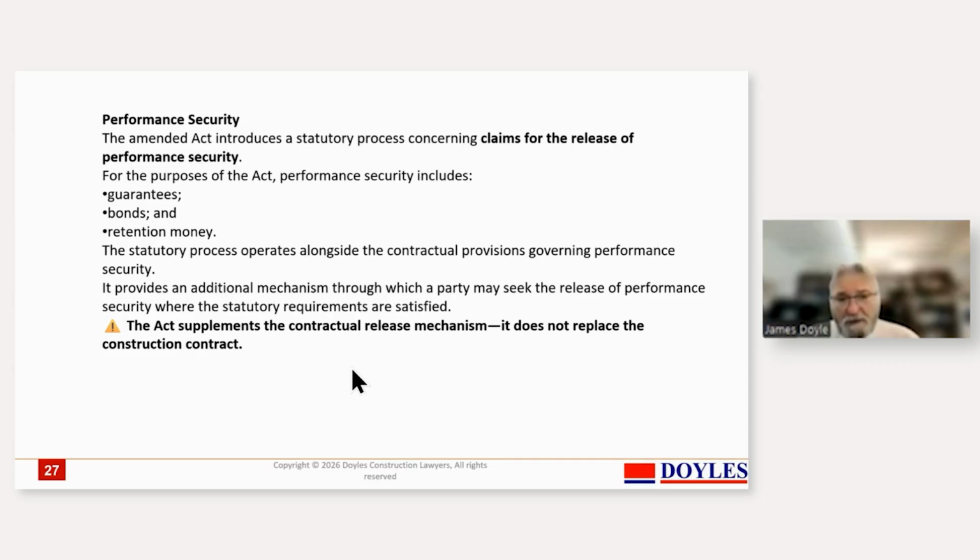But recently there's been a case where somebody had to put up security in order to ensure the condition of pre-ordered goods. So it ordered goods that would have to be eventually included into the construction, and that security was provided again by way of bank guarantees. And the court said, well, that's not really allowed under the Act. The situation is if he's provided the goods and you've accepted them, then you should pay for them. And under the Act, that security was released back to the contractor, but the performance security was one which is seen to have a different nature and was therefore liable to be called up.